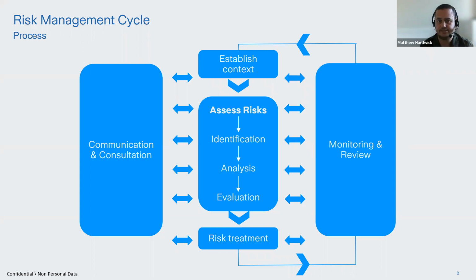When you look at your risks that you've already got, just challenge yourself around, are we really identifying the root cause of this, or are we almost documenting that negative element, that consequence, as being the identification? Once you've done the identification and you've got that right and you're happy with the root cause, that's when you can move into the analysis.